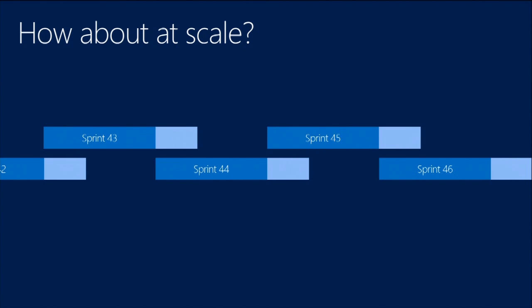Okay, so it means it's ready to go to production at the end of the sprint, on the last day of the sprint. And so that includes, like, it's been performance tested, it's been verified for localization, tests are all passing, security, all that kind of stuff. All those done criteria. The light blue item is just meant to be a light verification. The expectation is you should not find bugs in that time. If you find bugs in that time, someone checked in bad code, and we need to figure that out. So it's meant to be maybe a day's worth of work across the QA team, several people, to verify that.